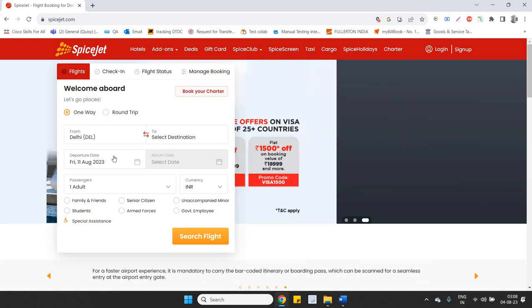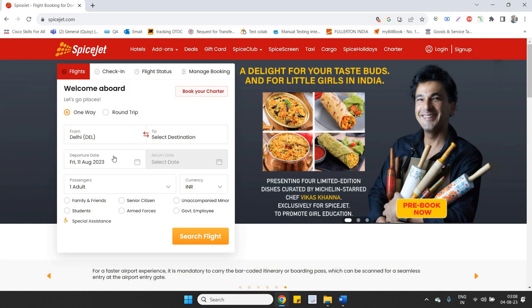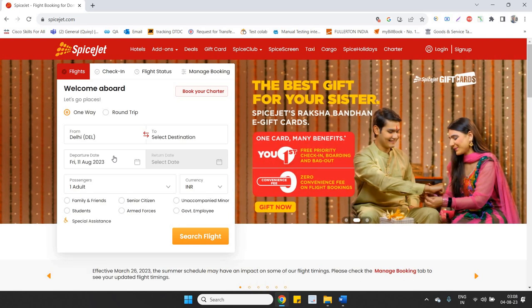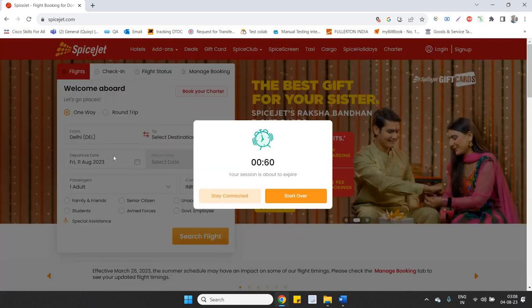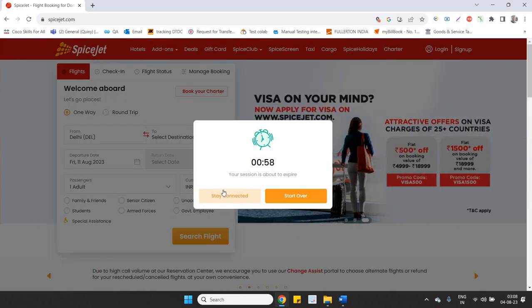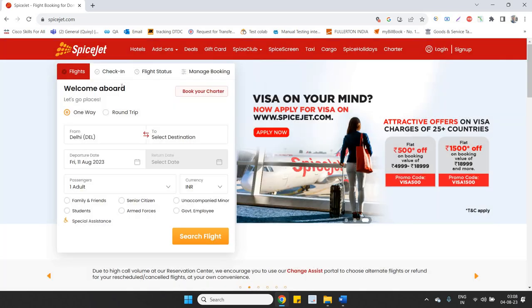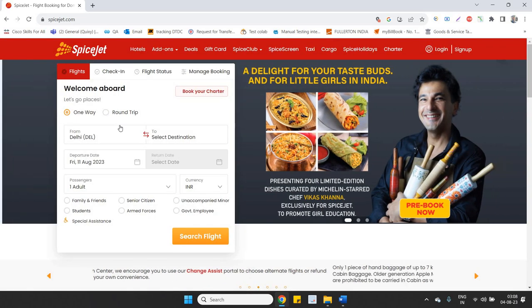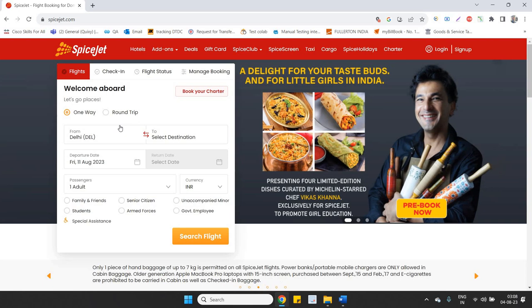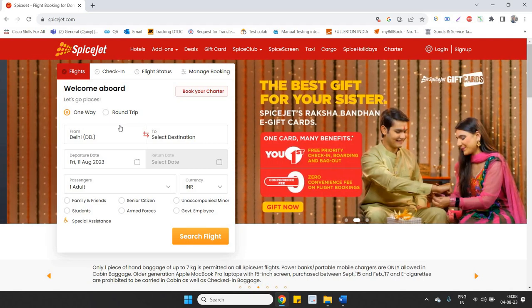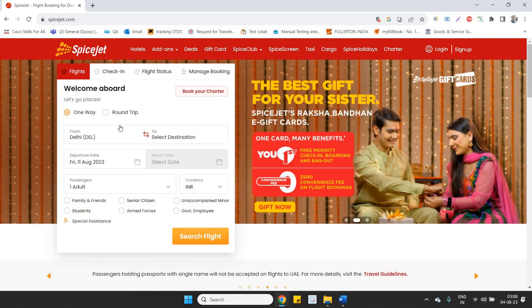So I want to add the round trip, and I want my customers to be able to select the passengers and currency as well. So this becomes the change request. So this comes under this epic again. Now, what the developer and the BA will do is take up this change request and create a new user story, and that will be linked up to the epic.